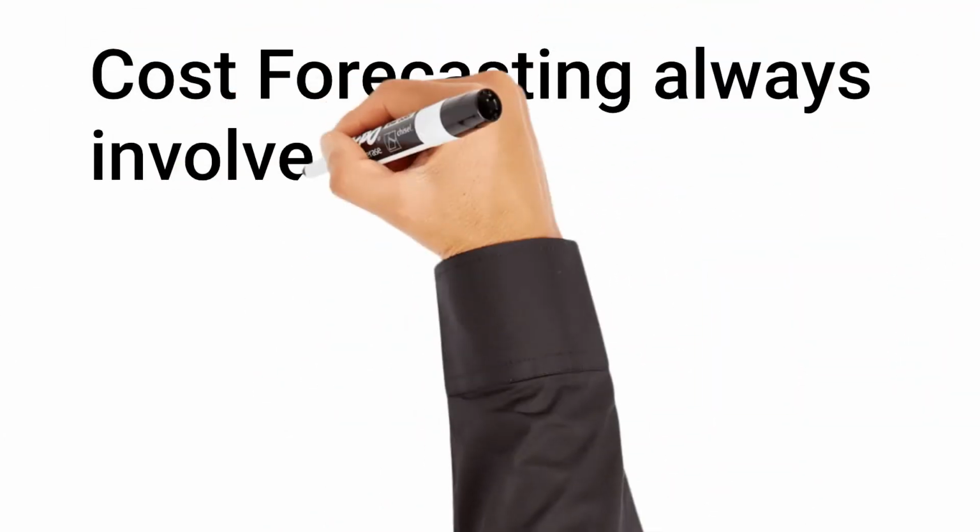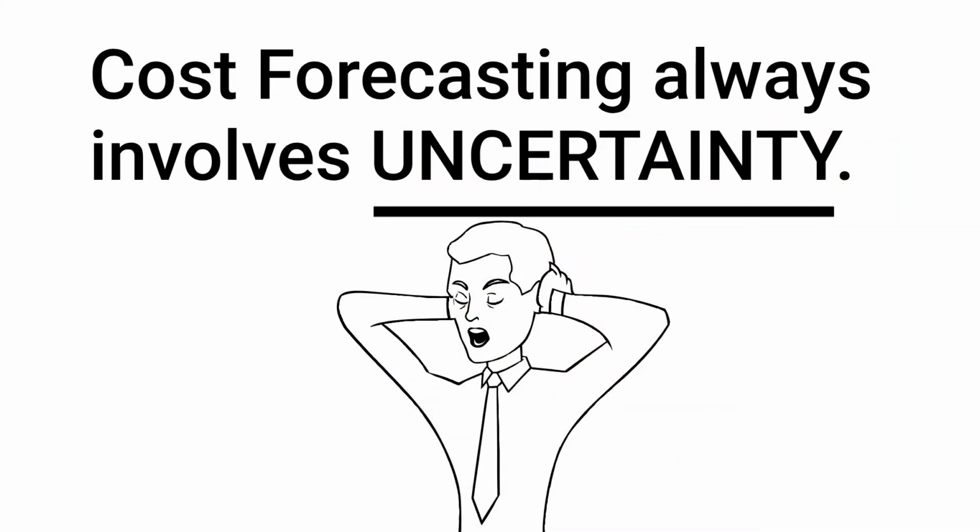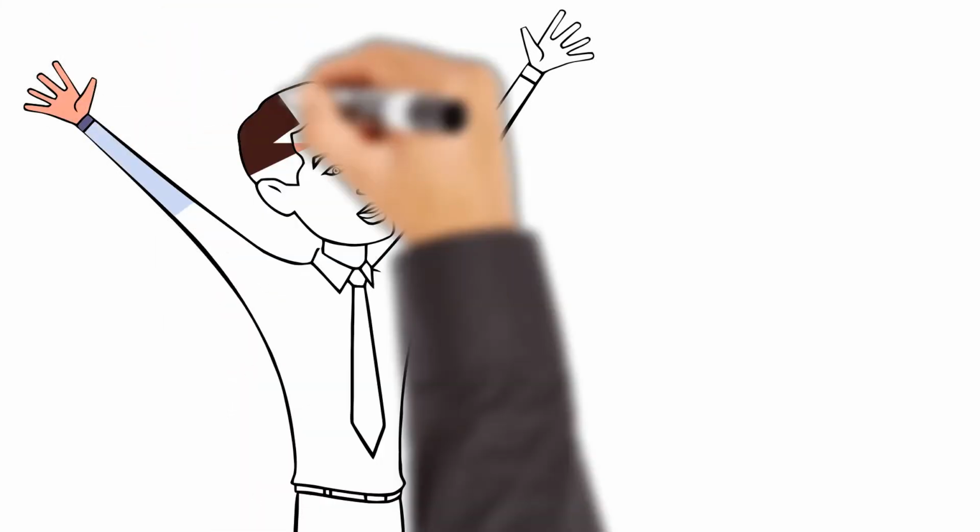The challenge with cost forecasting is that it always involves some uncertainty. To further contribute to this uncertainty, the project continuously grapples with issues like project duration and people. The longer the project, the greater the uncertainty. This is similar to a planning horizon, in the sense that if a project is of a shorter duration, you are more likely to account for most of the costs. The number of people and their skills will be a huge factor in estimating their costs.